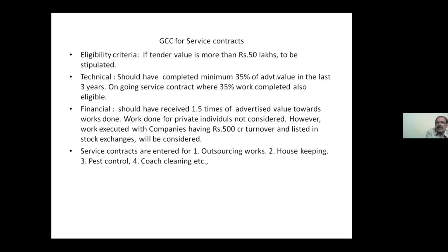Work done for private individuals is not considered. Suppose the contractors have done for some private agencies, same service contract, that credential will not be considered in service contract. However, work executed with companies having more than 500 crores turnover, like L&T, Reliance, all these companies having crores of turnovers. So in such companies where the turnover is more than 500 crores and which are listed in the stock exchanges, even in works tenders also, this is there, please remember. Work done for private parties where the turnover is more than 500 crores is considered for financial and technical.